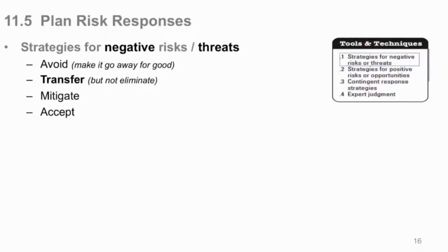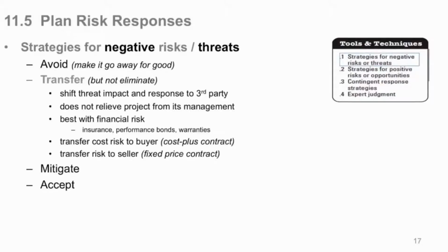Okay, transfer the risk, but not eliminate it. Shift the threat to a third party and the response to a third party. If it happens, they deal with it. It doesn't relieve you from its management and its responsibility.